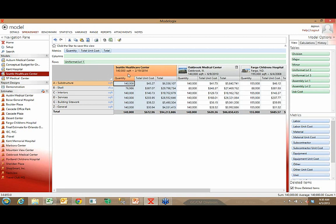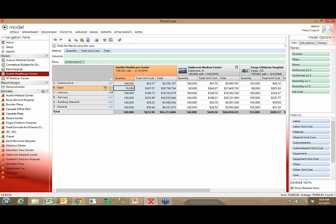A key piece of model objects is they don't have to be. You'll notice that the shell of the structure is actually not driven off the size. It's actually driven off of another value. So you'll notice over here it says square foot of contact area. Every one of your work breakdown structures in model objects, you're allowed to set up the unit of measure which makes the most sense when analyzing that unit price. And just like I did for the shell, obviously the driver or the quantity is a different value than the overall size of the project.